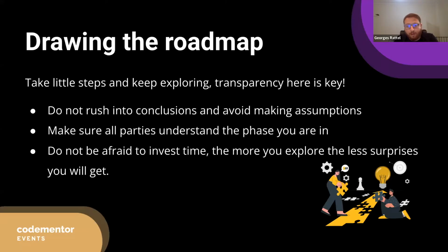Same thing with the client. If they figure out that what they're asking for is eventually way outside of budget, they should be able to simply tell the developers or freelancers that, okay, this might go out of budget and we might not have the budget for it all at once, so let's do it in smaller phases. Otherwise, the developer will think that he or she has secured a project for a certain period and a certain amount, which is not the case. So that's before you start, for kicking off the project.